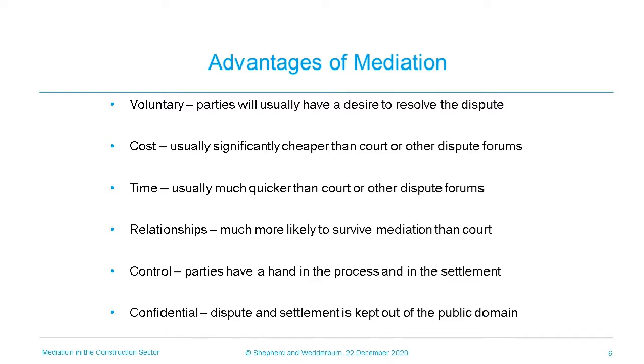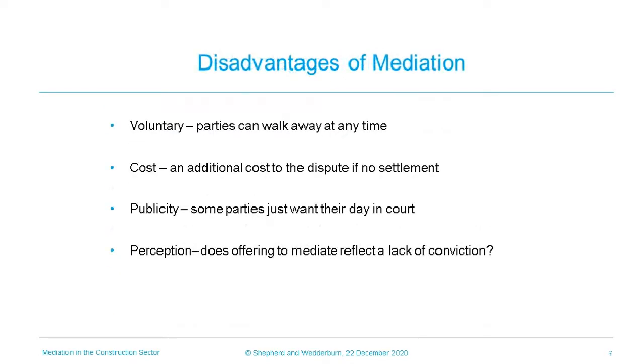The importance of confidentiality to the process was underlined by the English case of Pharmacist Limited against Secretary of State for the Environment, Food and Rural Affairs, in which a confidentiality clause was implied into a mediation agreement in the absence of any express provision to that effect. It was adjudged that the only exception to confidentiality is where it is in the interests of justice to allow disclosure, an exception that is only exercised in exceptional cases.